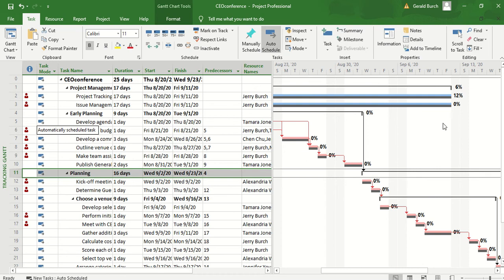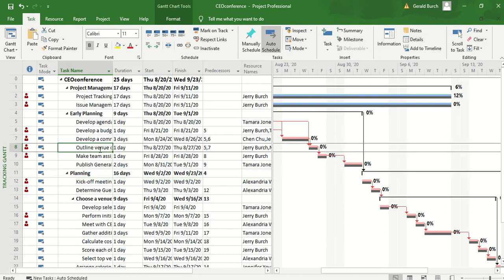So, with that said, typically what happens is that you're going to go in and try to get updates to update each and every one of your tasks as you go through this process. That often means that you're going to be reaching out to other people, asking them to give you information. I have found that weekly updates is about as frequently as you need to be asking for those things.